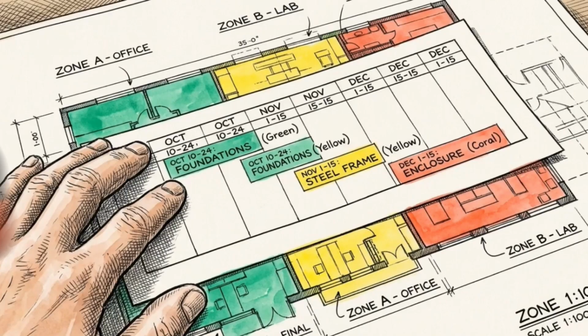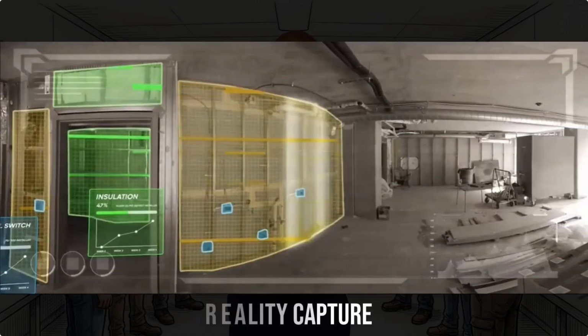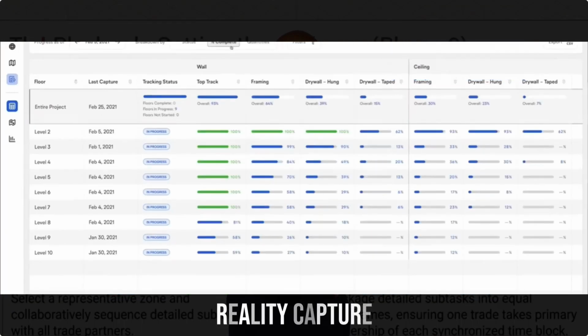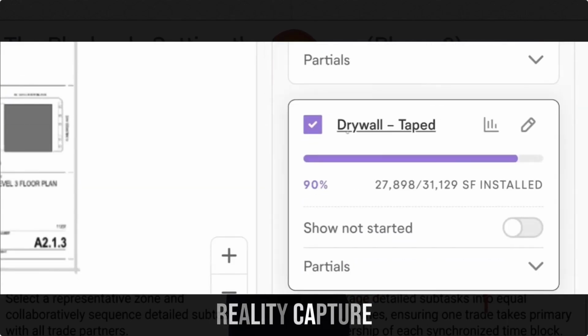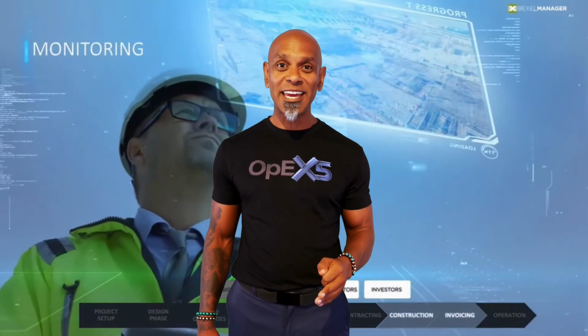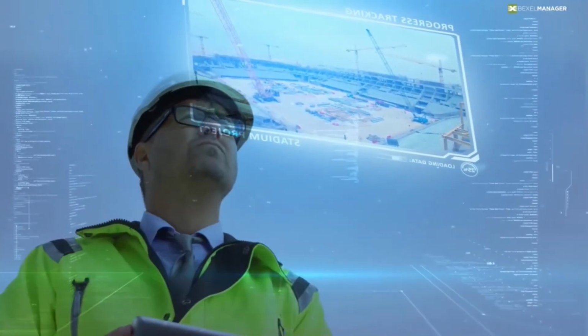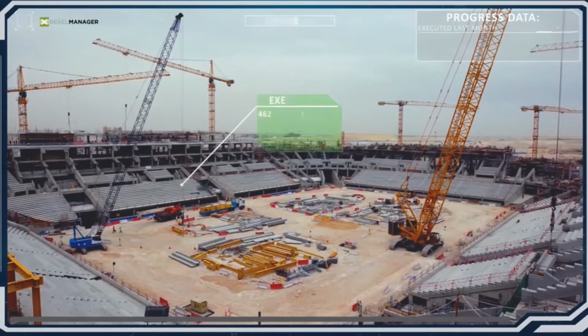When you integrate Takt planning with WIP, or work in progress, with reality capture, we can integrate these 2 workflows into one streamlined process to drive real-time and proactive solutioning to roadblocks. More importantly, 4D plus Takt allows the project team to simulate the details in each work zone during pre-construction to spot spatial clashes and bottlenecks before they ever happen on site.